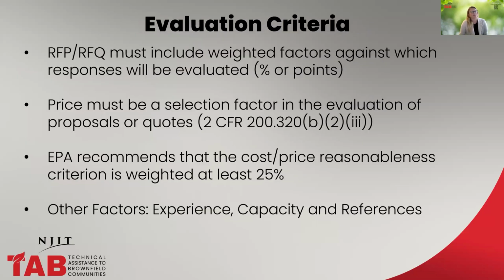Getting into the evaluation criteria. Another piece of information you want to make sure that you are including in your RFP or your RFQ is what the evaluation criteria is going to be. That way vendors responding really understand how it's going to be evaluated and what the award is going to be based on. So for your RFP or RFQ, you want to include your weighted factors against which the responses are going to be evaluated. That can be percentages or a point system.